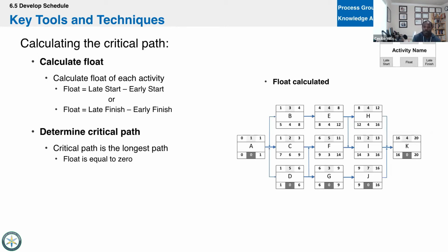So like that formula, pessimistic plus 4 times most likely plus optimistic divided by 6, you'll have to remember that enough to at least write it down, and you're going to practice writing it down over the course of your studies, and that's how you'll be able to do this.